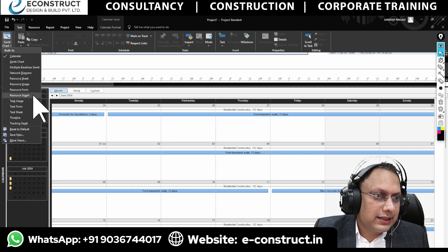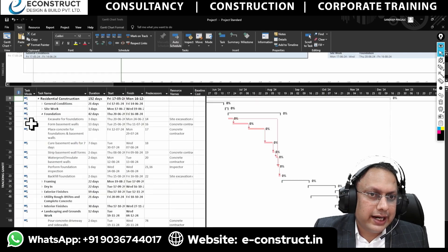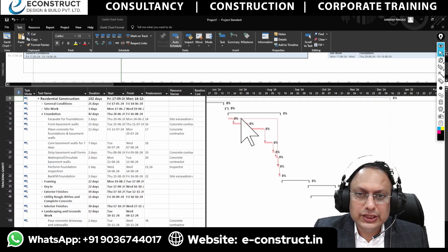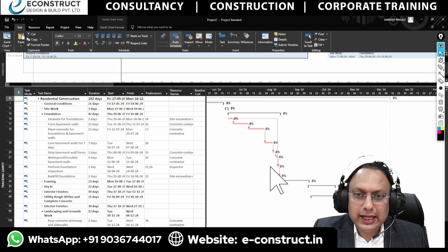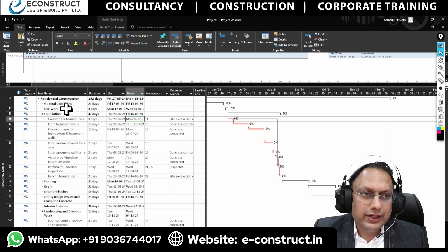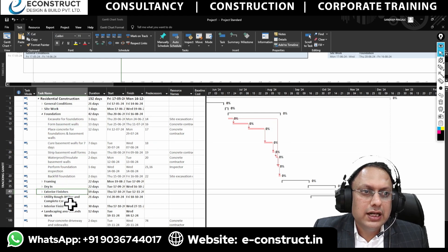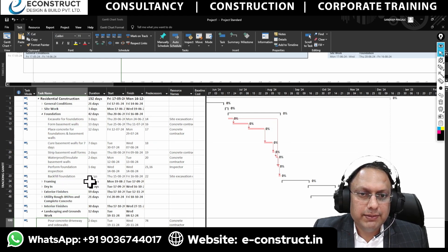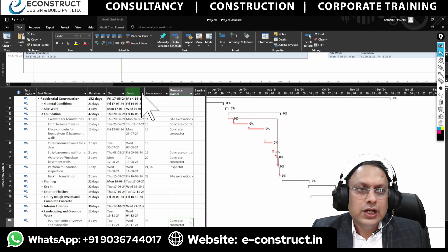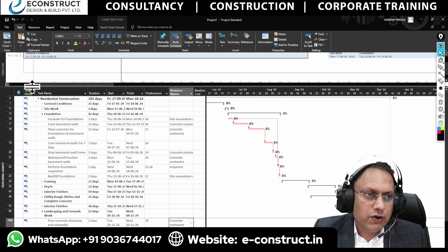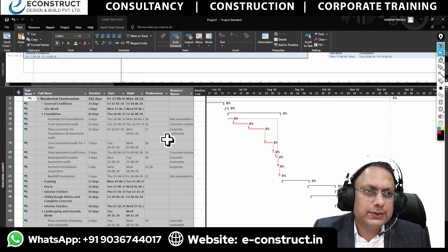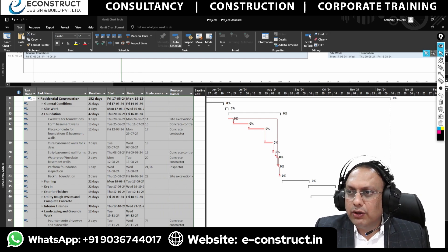The timeline and tracking Gantt chart will tell you the critical path — you can see the red lines showing exactly where the critical path is. These are the activities that if delayed will impact the project. You will see duration, start date, finish date, different task names, sub-task names, and what types of resources are required. This data can be cut and pasted from Excel to MSP and from MSP back to Excel.